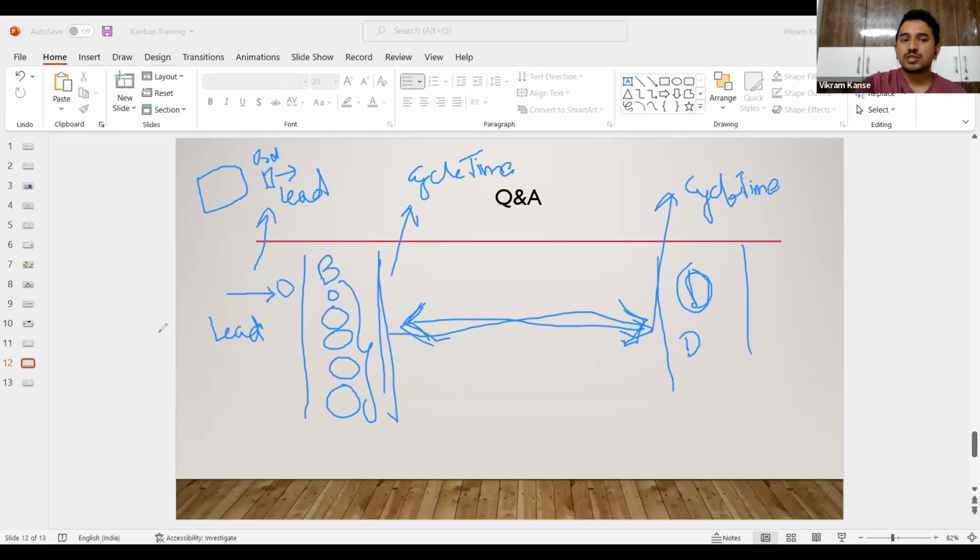So suppose it is 8:30 a.m. here, my time. So my order was given at 8:30 a.m. But my actual work might have begun at somewhere around maybe 8:35 a.m. I might have spent like 20 minutes or maybe 15 minutes. So that would end my cycle time at 8:50 a.m., which means my cycle time was 15 minutes.